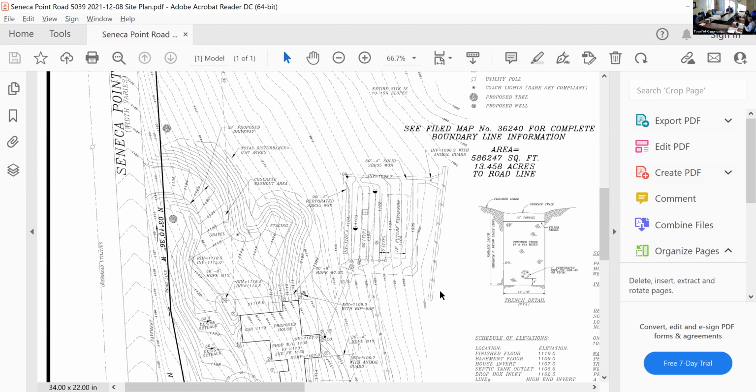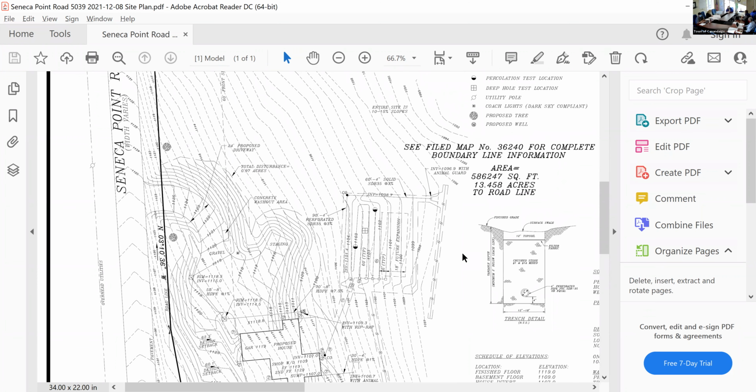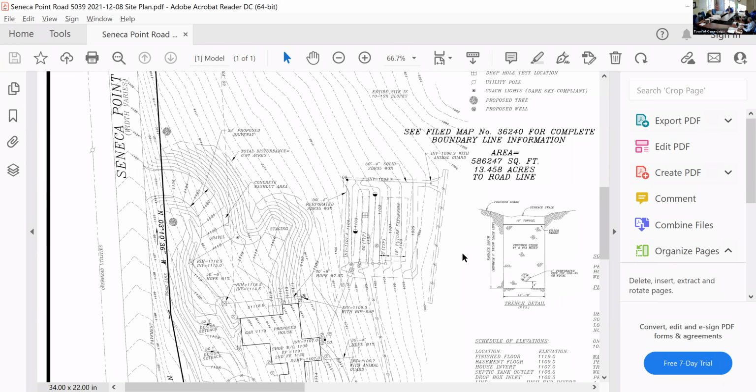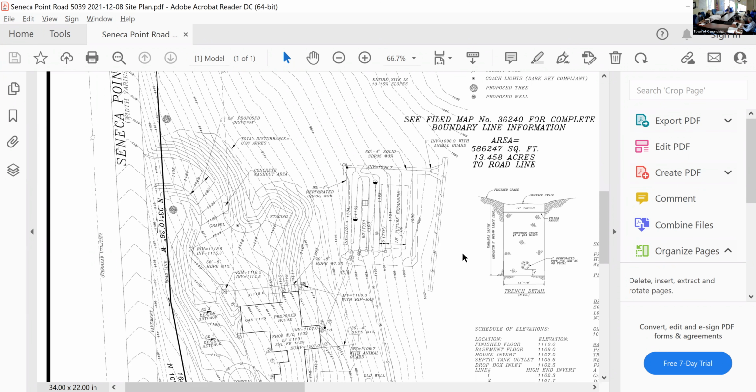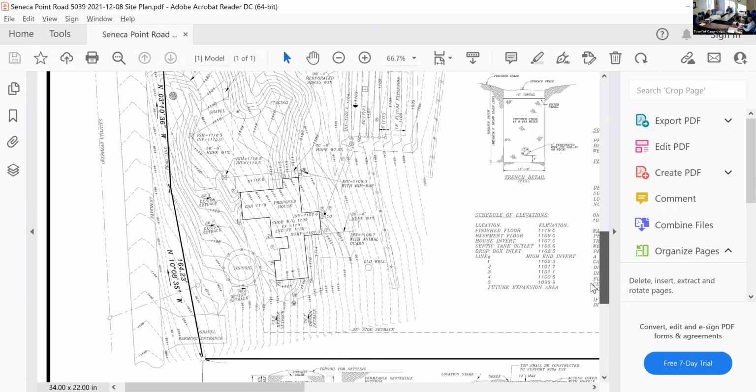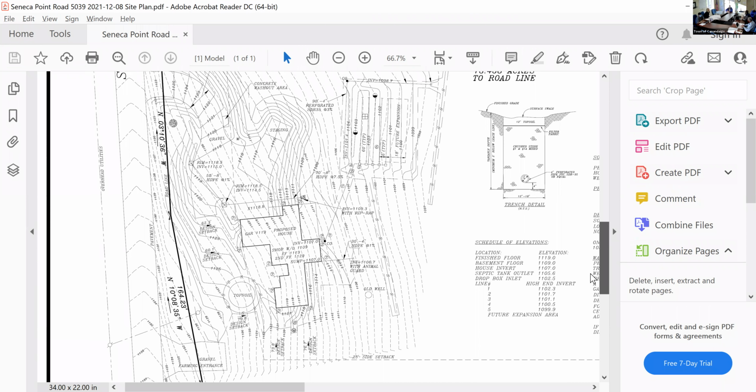Because then Chris doesn't have to worry, because the next hurdle is 5 acres, and you're gonna be way below 5 acres, right? So you're better off just obtaining it. It's an NOI that has to be filled out and submitted to DEC. And it just says that I have a permit that allows me to do more work than 1 acre. And I'm going to do periodic inspections, not necessarily you, but a periodic inspection that maintains that the property's in conformance.